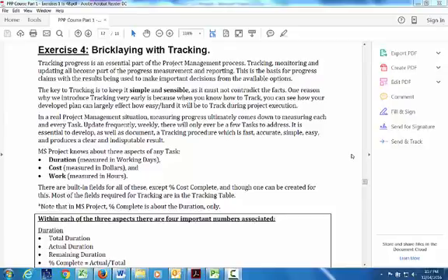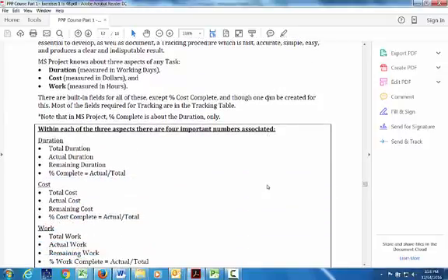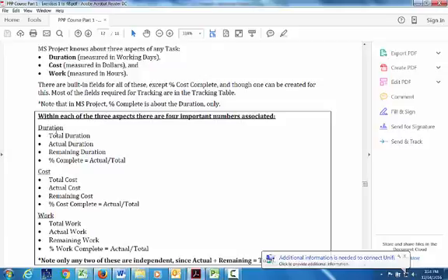In this fourth exercise, we'll look at tracking. The important thing about tracking is to understand what the computer knows and what it doesn't know. You've given the computer estimates of durations, and then you've assigned resources. So basically, it's got knowledge of the duration of the task, through the resources, the cost, as well as the hours of work that is undertaken on a task. So if you've got 2 people working on the task, then for every 1 hour duration there's 2 hours of work occurring. Most of tracking is actually done in duration.